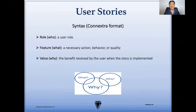The most popular syntax for user stories is formally called the Connextra format. It typically includes the role, the feature, and the value, which is better known as the who, what, and the why. The role, or the who, is the user or the customer. The feature, or the what, is a necessary action, behavior, or quality. And the value, or the why, is the benefit received by the user when the story is implemented.